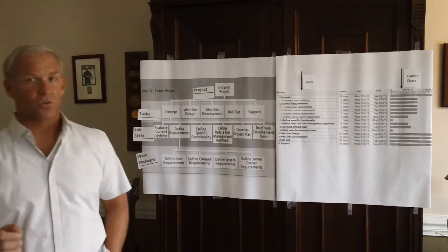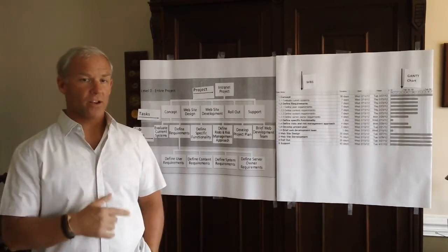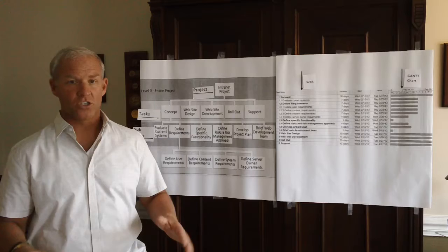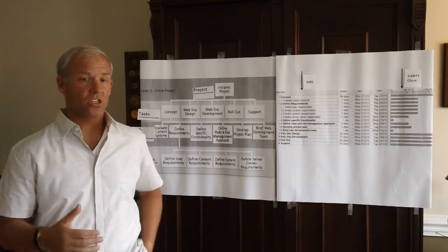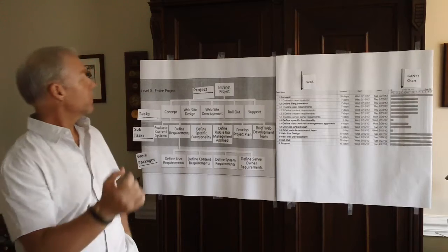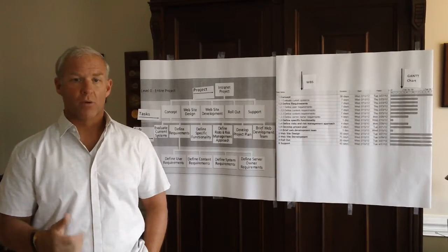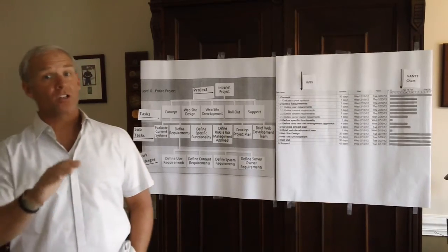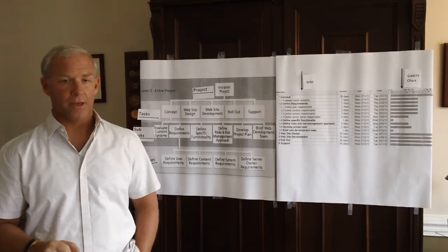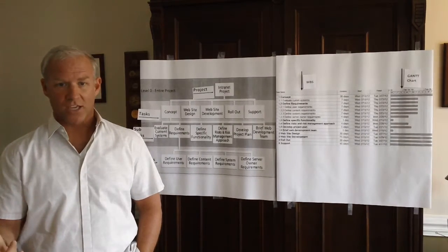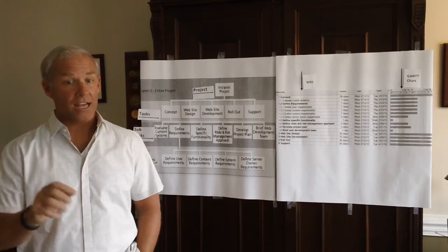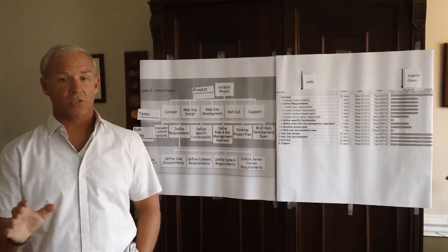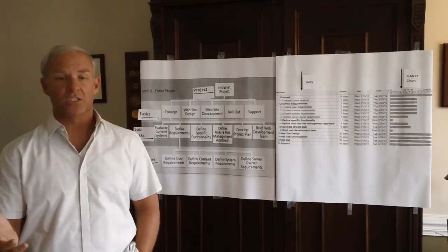Now, before I begin discussing the reasons for a WBS, remember, the work breakdown structure is a foundation of your project. This means almost everything that occurs in the planning process after the creation of the WBS is directly related to it. For example, project costs and time are estimated at the work package level, not for the project as a whole. And I'll illustrate more here in a little bit. Risks are identified at the work package level, not just of the project as a whole. This means that work packages are assigned to individuals by one of the PM's project management office staff, and that name is listed in the WBS as well.